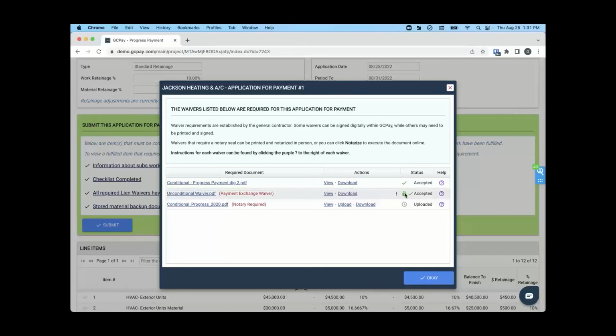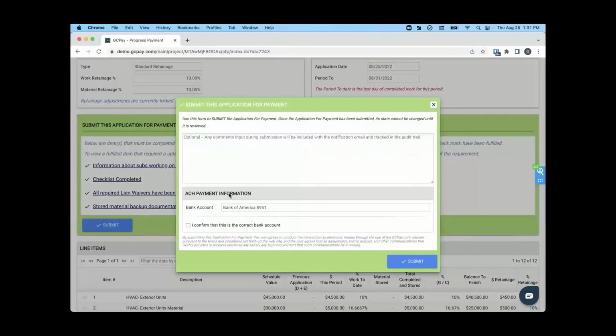Now, it works nicely with the electronic payment method because we can track those funds, and when we see that they've cleared, and typically that's 2 to 3 business days, we then strip that watermark, and you have that unconditional free and clear without even having to contact the sub, let alone go chase it down. And I'll show you that as we wrap up the demo.